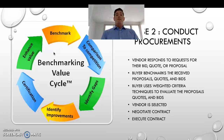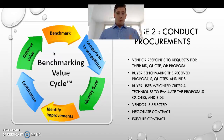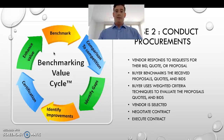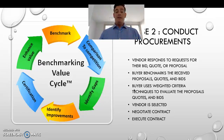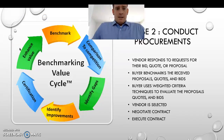The vendors will respond to the request for bids, request for quote, or proposal. The buyer will benchmark the received proposals, quotes, and bids. Benchmarking is a way to get an outside perspective on the quality or value of the work from someone other than a vendor. The buyer will use weighted criteria techniques to evaluate the proposals and bids - this is how you choose who you're going to select to do the work. Once you select a vendor, you negotiate the contract, then execute it and everyone signs.